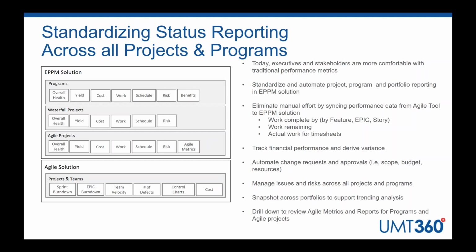So, at whatever level you're bridging, feature to epic to user story across these solutions, we want to be able to automatically aggregate information such as work complete, work remaining, actual work. So these reports can be fully automated. From a status reporting perspective, we also want to look at tracking all the investment status of our projects and programs in the EPM solution.